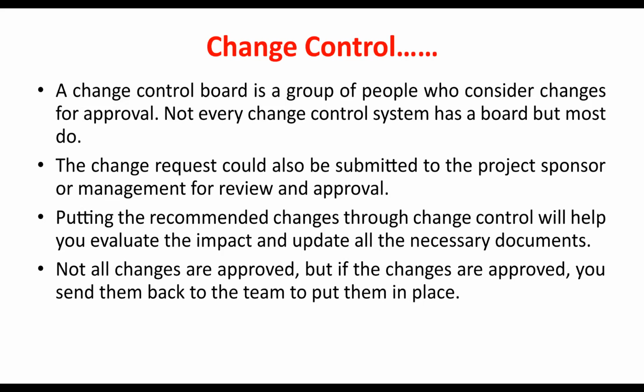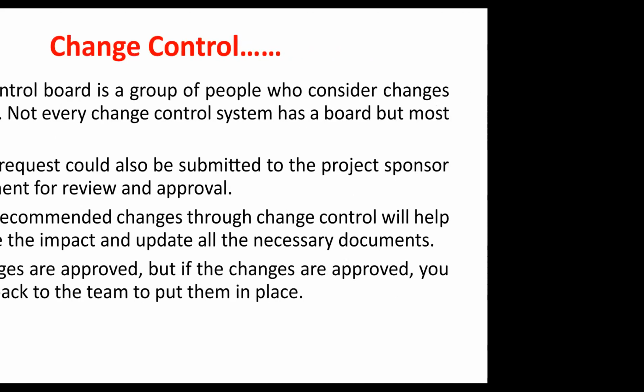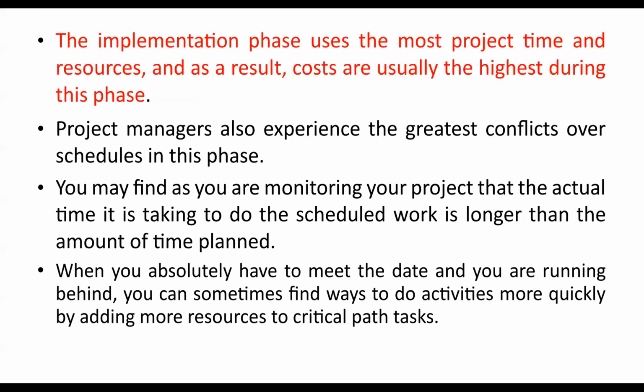Putting the recommended changes through change control will help you evaluate the impact and update all the necessary documents. Not all changes are approved, but if the changes are approved, you send them back to the team to put them in place. That is what usually happens.